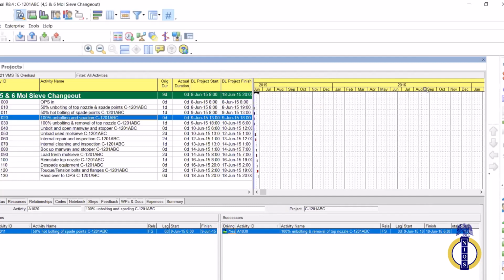But I know that most projects is only maintenance. When you're doing maintenance, you do maintenance daily. But when you're doing projects like Trade 7 projects, you report monthly. The max is weekly, but the major project reporting is monthly, because for a project that is spanning 4 years, you will not be reporting daily and coming to Primavera then, because even the progress will not be too significant.